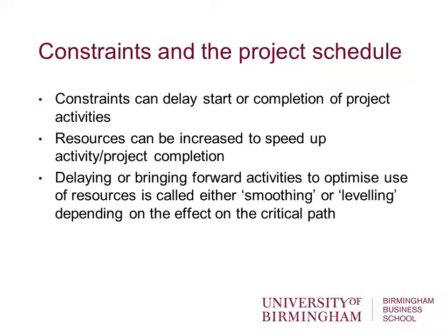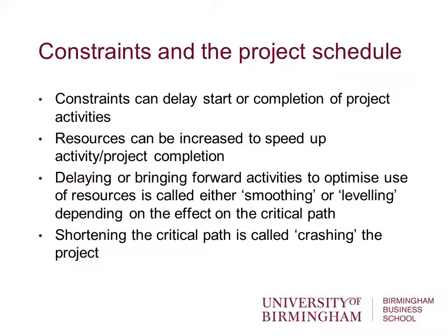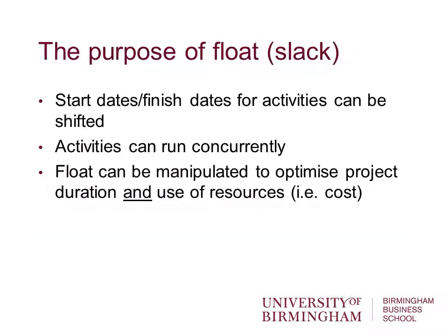Delaying or bringing forward activities can optimize the resource use in projects, so we can do what we call smoothing or leveling. I'll talk about those briefly. And we can also do something called crashing, which is shortening the critical path, removing float from the project, loading up resources to carry out certain activities more quickly in order to get the project completed in a shorter period of time, or at least plan for the project to be completed in a shorter period of time.